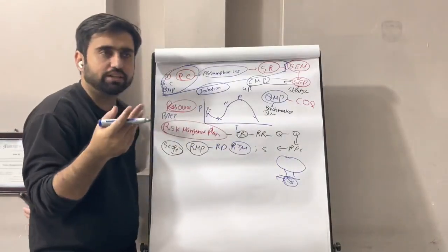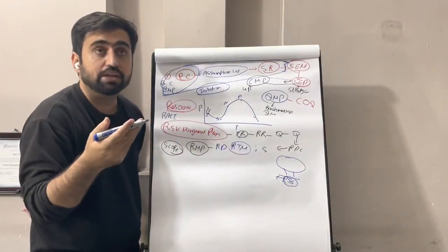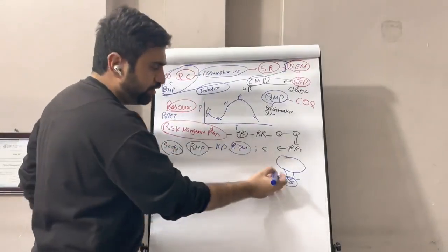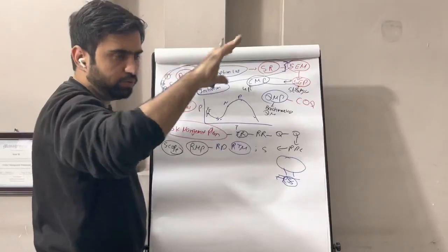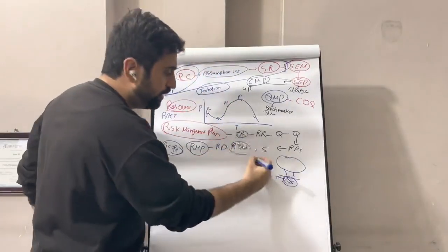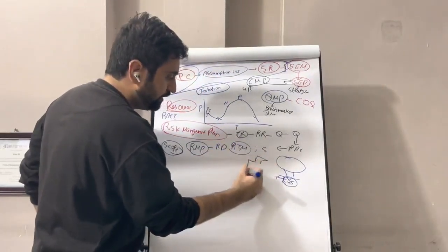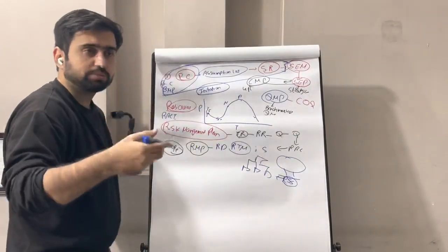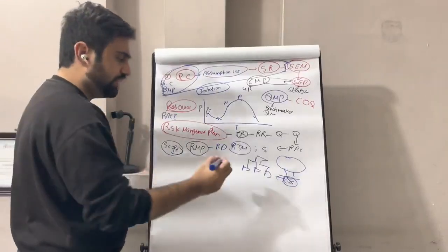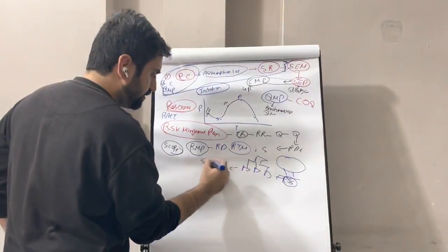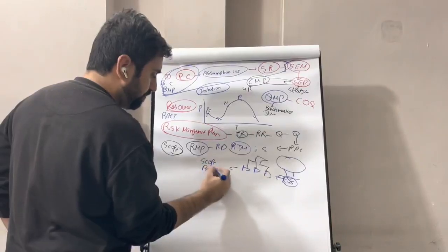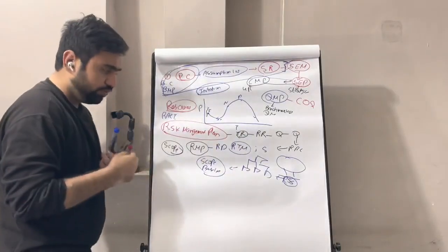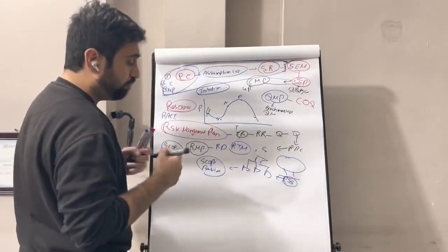So we use product analysis, decomposition, value engineering and cost analysis to make the project scope statement. Then we divide the project scope into work, like we divide the deliverables into the WBS, and we make the WBS dictionary. We get the project scope statement, WBS and WBS dictionary approved, and that is basically our first baseline, the scope baseline. Okay, so the next is the schedule baseline. The lowest part of the WBS is called a work package.